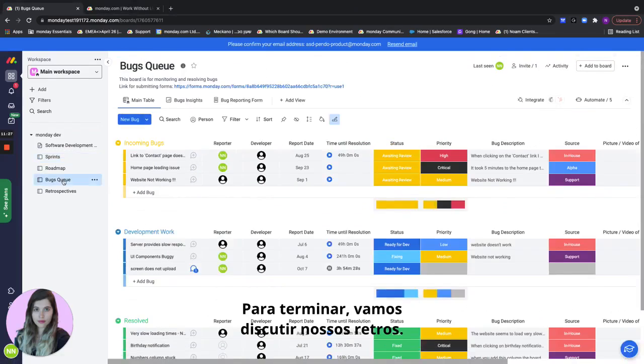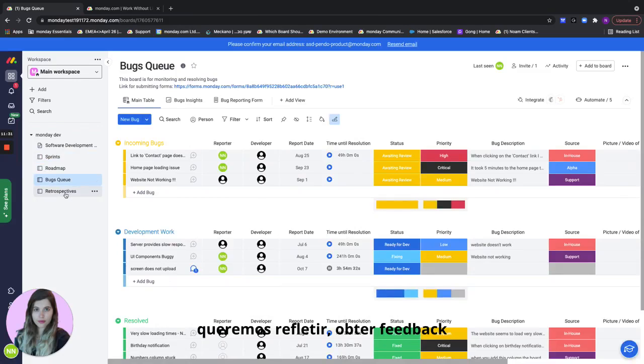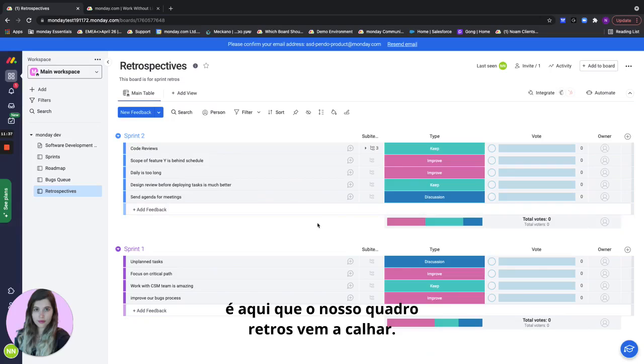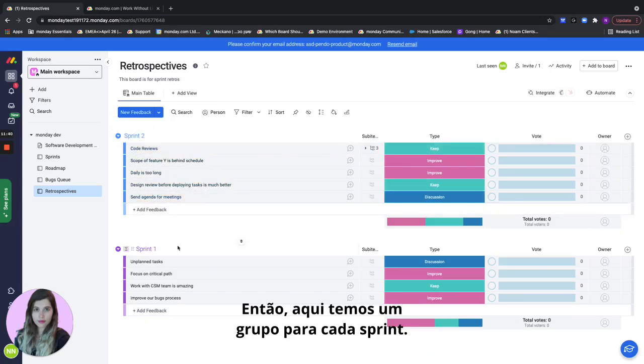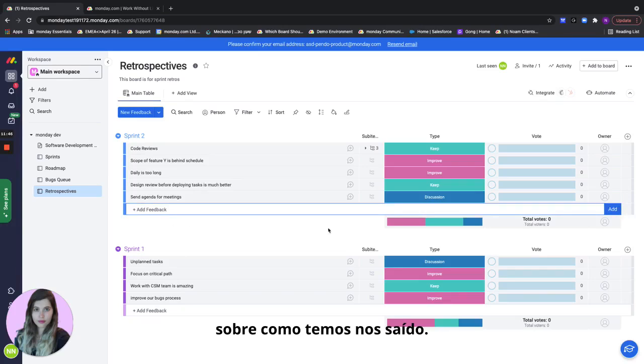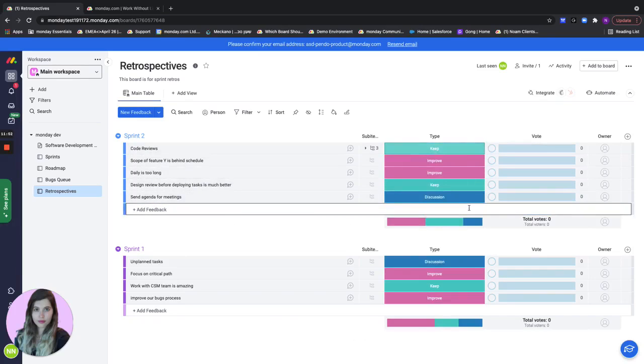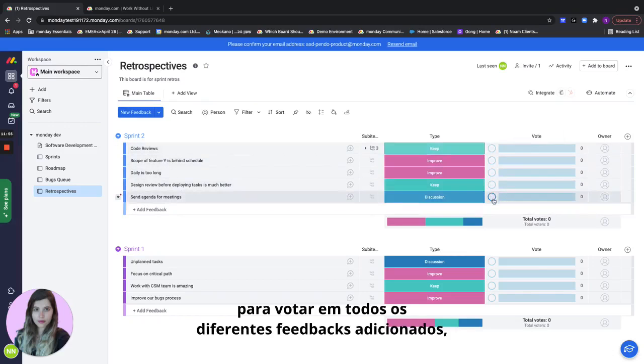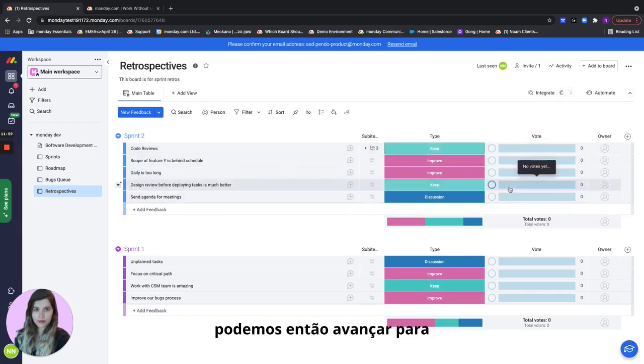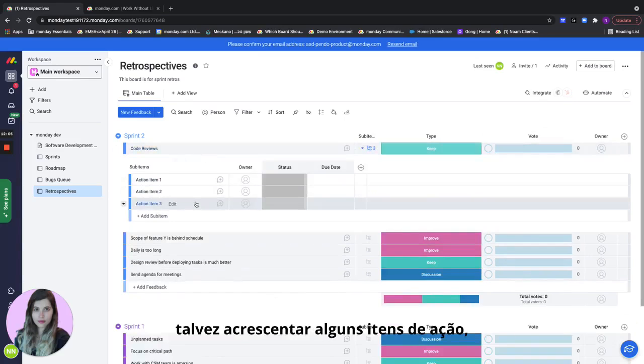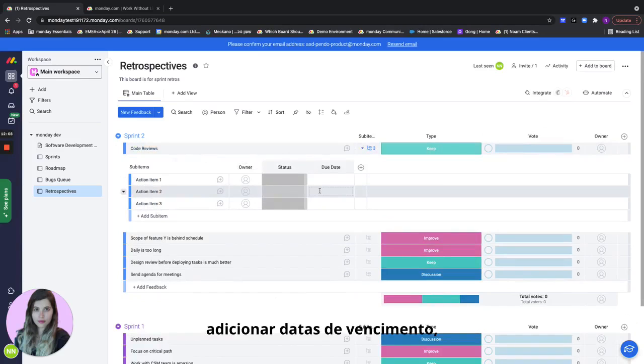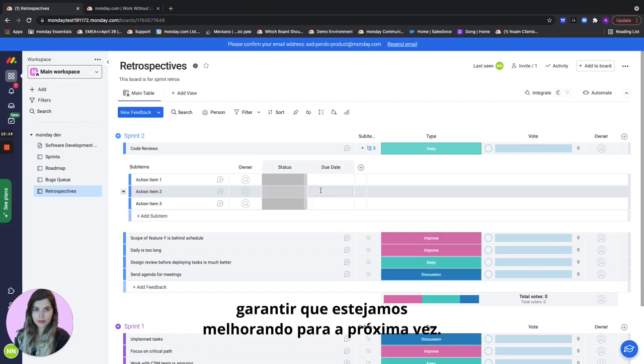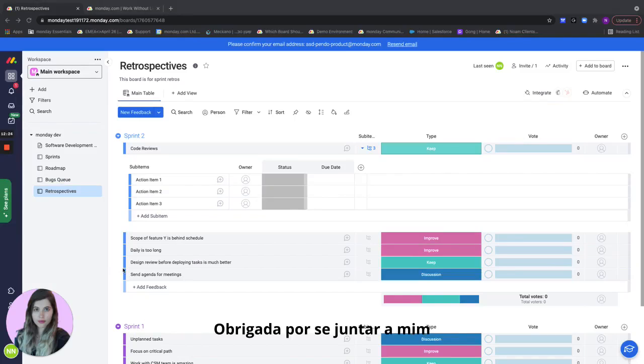Last but not least let's discuss our retros. After every sprint we want to reflect and get feedback and see how we can improve and this is where our retros board comes in handy. Here we have a group for each sprint. The team members can add different feedback once the sprint is over regarding how it's been, how we've been doing, choose the type whether it's something to keep, a discussion, or something to improve. The team can take some time to vote on all of the different feedbacks added and then once the team members have voted we can then go ahead to the ones that have been voted on the most and actually discuss them, maybe add some action items, put owners, put due dates, just to make sure that we're actually going to take care of this feedback and make sure that we're getting better for next time. So this is it for our software development solution. Thank you for joining me and good luck with your successes in monday.com.